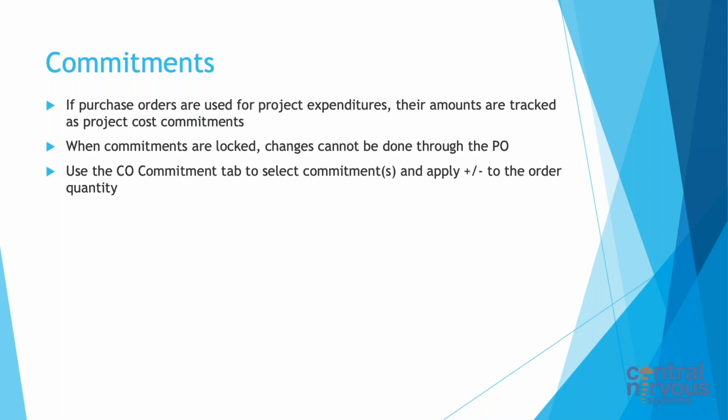That's what most people do this for: look at a subcontractor, open up a PO for that, and track that to the project. That's the beautiful part of this, you can apply that to your project, and it shows up on the project showing you the commitments you've made for the projects against these POs.